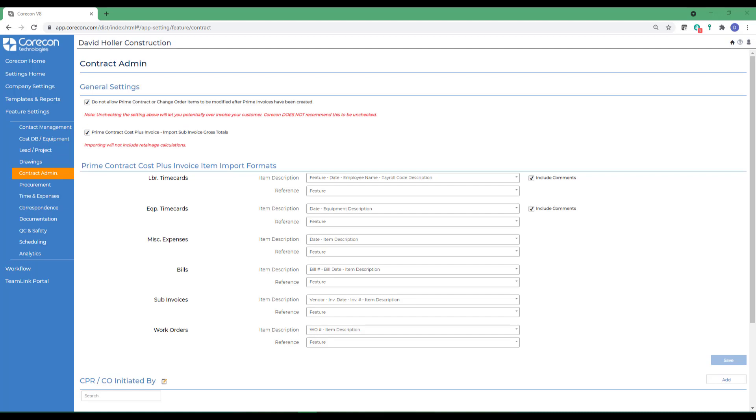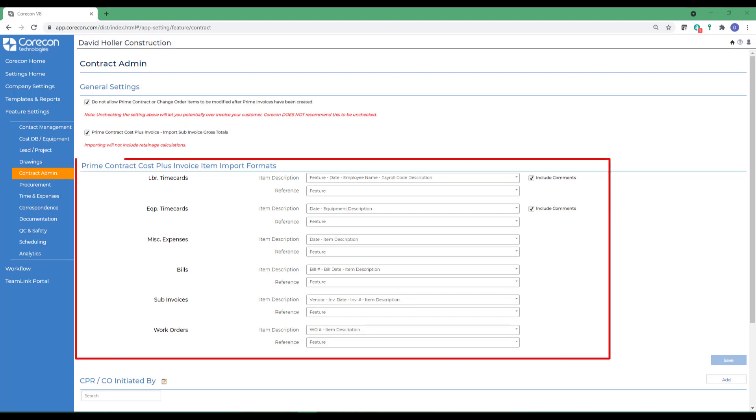The next option is the prime contract cost plus invoice item import formats. Cost plus prime invoices usually include expenses that are imported into the cost plus prime invoice, as opposed to entering them manually.